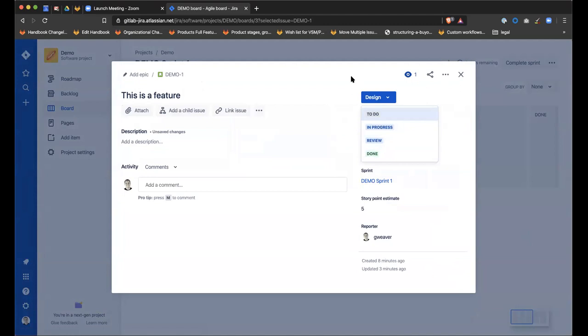So this is one of the things that's really tricky about GitLab that we're going to have to figure out. It's easy to do in this context, scoping it to a project, because the issue belongs to the project and you have a single issue board, so you can't have multiple contexts that an issue lives in. It literally only lives in this one. The challenge within GitLab is that you can have an issue that lives in a project also on a group level issue board. And so to actually have this state machine on the issue itself, you would have to enforce the statefulness, or the flow of issues, at that top level group, and then have that cascade all the way down, which makes it not very flexible when you have lots of teams sharing one group. You know what I mean? Yep.